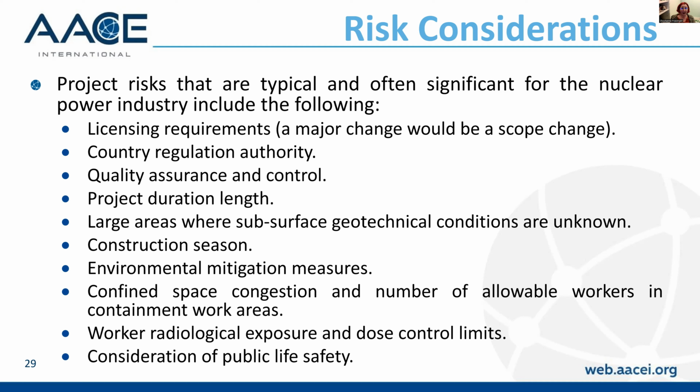And if that's happening, then we're affecting our interpretation of estimate accuracy. What I mean by that is, if we haven't thought about all of the systemic risks, we are being overly optimistic in our view of the estimate, and will probably have a narrow range applied to it. And that may not necessarily be the case.